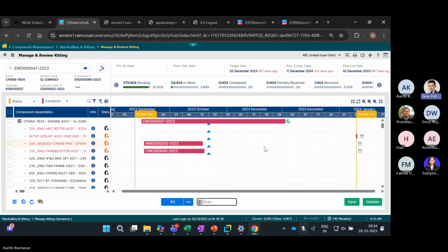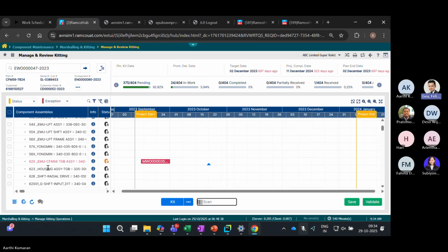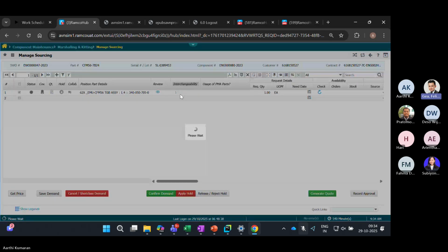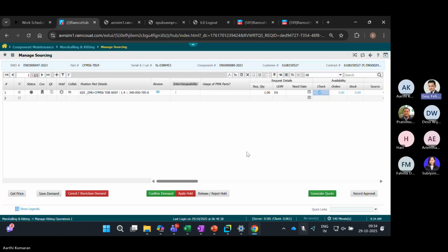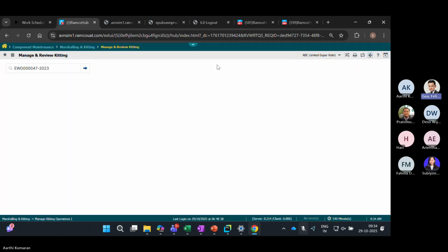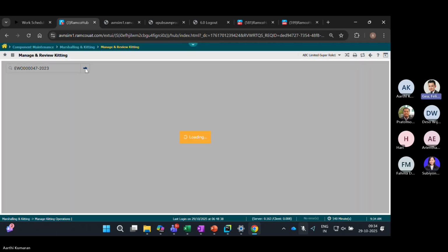This is a very important screen, not only to track, but also to make some management decisions. Let's say your TAT exceeds a certain limit, like your subcontractor says it will get delayed, then possibly you might need to think of swapping from your existing customer engine, which is getting due, or ask a customer whether you can do certain exchanges. So from a project management standpoint, this is the most important thing. Especially it is used for your review, to take some calls, because any delays are going to impact your delivery time.